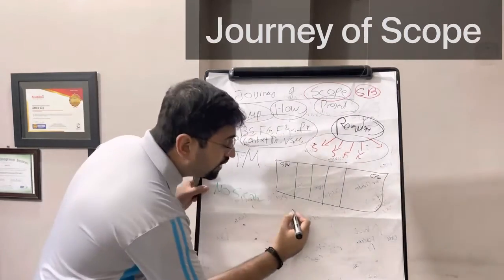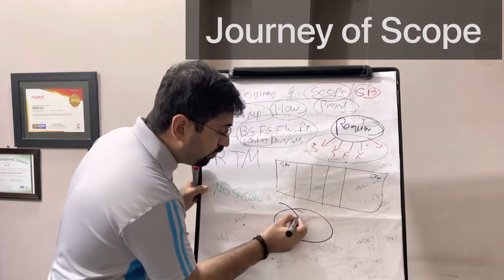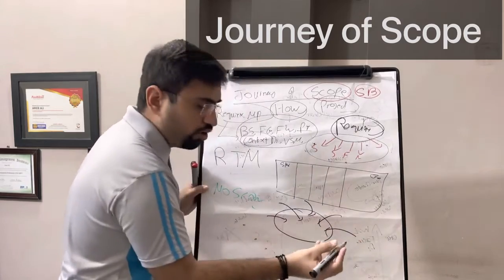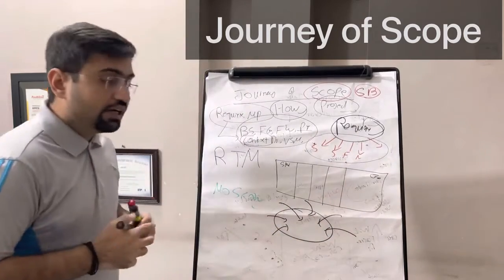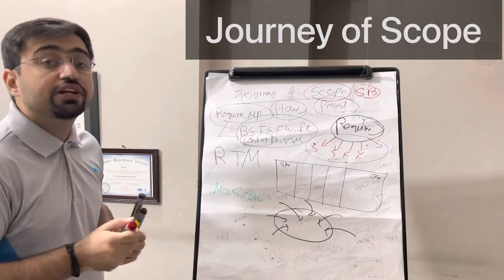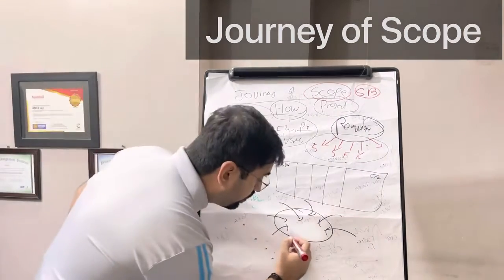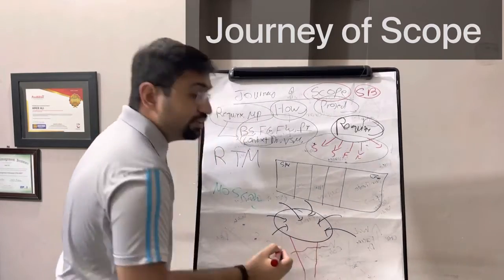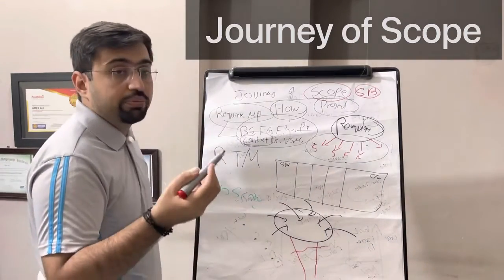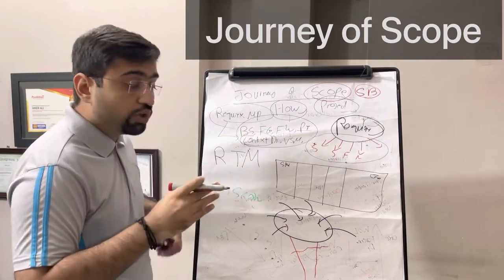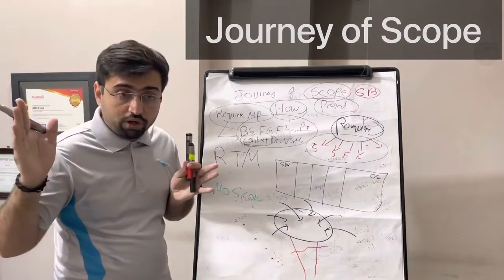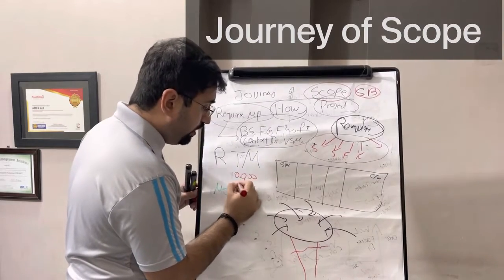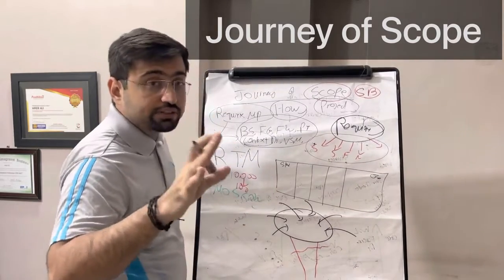Let's say we collected all the requirements, from requirement documentation and requirement traceability matrix. Now you put a requirement filter on it, a scope filter on it. Only the requirements that can pass the scope filter will go in and become part of the scope. So requirements may be 10,000 and scope may be only 100 things. This difference can be that huge.